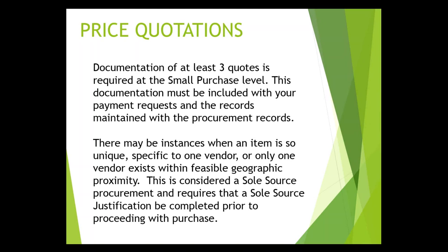The most common example of a sole source is when you may have scheduling and dispatching software that you want to upgrade. Obviously, you want to upgrade within the vendor that you have rather than having to replace your entire system just for an upgrade. So we can help you out with the justification for that. We just need to make sure that we have that documented when it occurs.